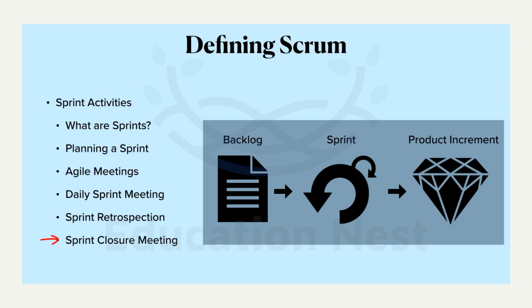In all these tools, each of the tasks is listed and given a separate dedicated space where you can record the story of how it is closed. From the start, when the sprint begins, they will start the task, name the task, and describe what is to be done. Then as the sprint progresses, after 2 or 3 days, if the team member has added some value to it, he will mention that status against that task. Even during the daily sprint meeting, the Scrum Master will ask the development team members, and whatever statuses they give have to be recorded against that particular task.